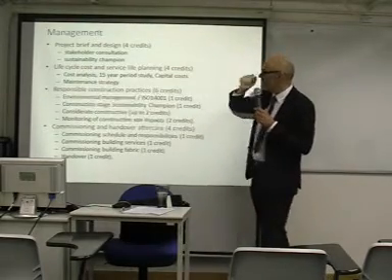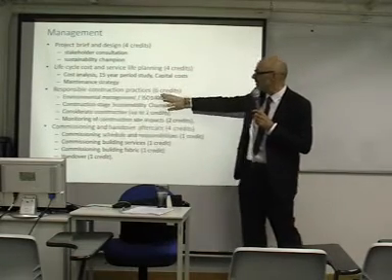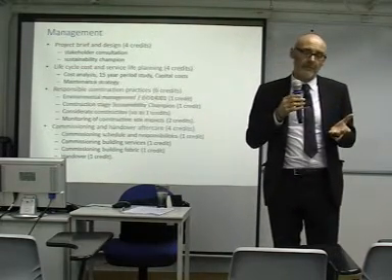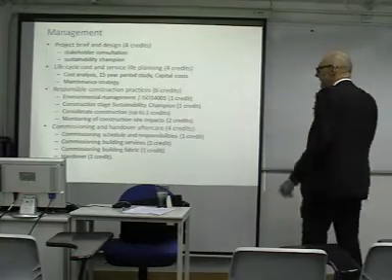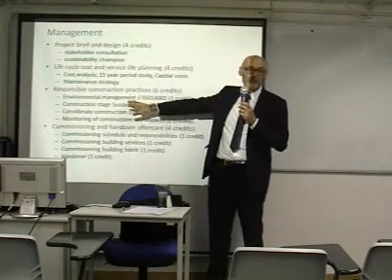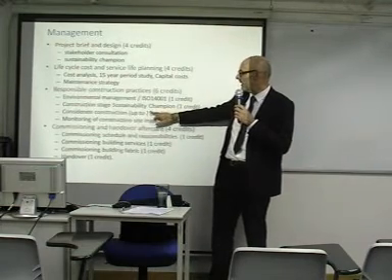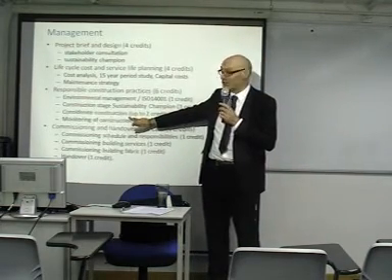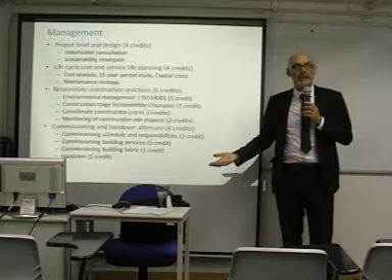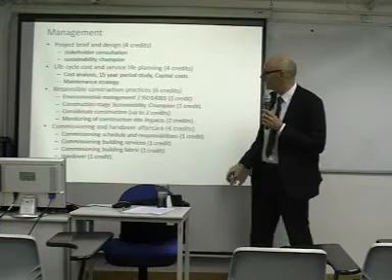Anyway, life cycle cost and service life planning. If you go into cost analysis, you can see the credits available. Just to highlight these responsible construction practices. Before I came to Leeds Beckett, Leeds Met, I was involved in housing. We really pushed responsible construction practices. We made it mandatory for all of our contractors to have ISO 14001, that there was a sustainability champion, that everybody was a considerate constructor, and that the site impacts were monitored. As a funding organisation working for housing, basically organising housing associations, we really pushed this one. We thought it was good for our residents.